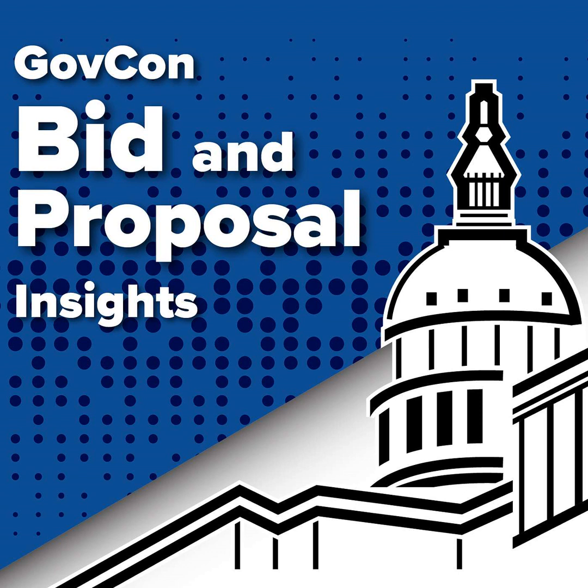You mentioned it's an IDIQ contract, indefinite delivery, indefinite quantity. Right. And all the task orders are firm fixed price. That's not just jargon, right? An IDIQ is like a flexible shopping list for the government. Kind of, yeah. An on-demand catalog of services. And firm fixed price means the contractor bids a price, and that's it. They have to stick to it, even if things get complicated. So they need to be really sharp with their bids. Exactly. There's risk involved for the contractor there.